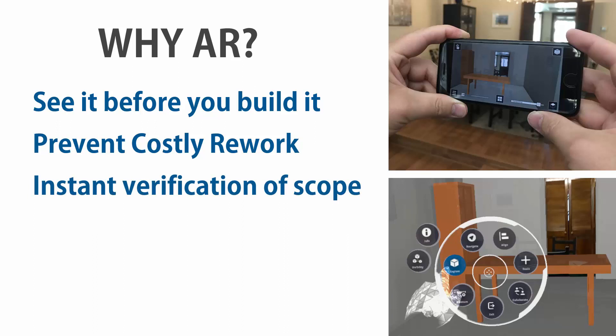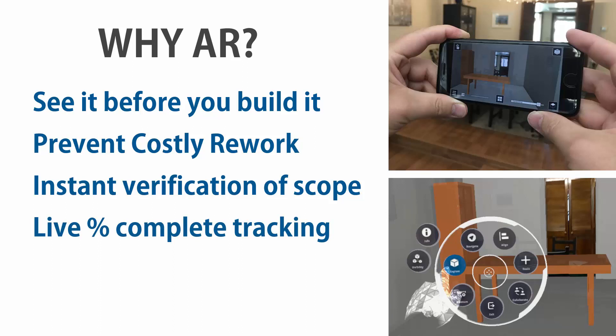Now, the other major thing here is that if you're a GC, especially, or if you're a site superintendent overseeing a team or squad, you get instant verification of the scope of work that you've done and you actually have proof that you did it. So what's great is you can actually see the digital assets overlaid of what you're supposed to be delivering, especially in those work packages or for that day. You can see that work, you can showcase and overlay the digital design with the actual work that you've done. And you can send that and take pictures and create to-dos of that information and send that back to the project manager and the GC to showcase what's actually been done and tie that to your schedule of values. Now, what's great about this is you got folks walking around the job site doing nothing other than tracking progress, especially for accounting purposes and ensuring that the reporting from subcontracts and everything is correct and accurate.